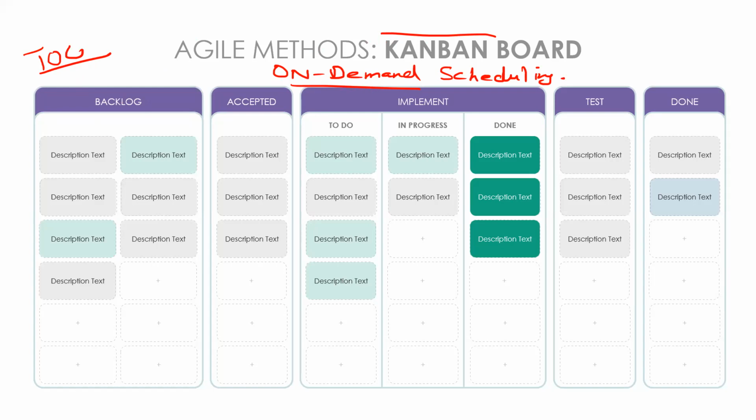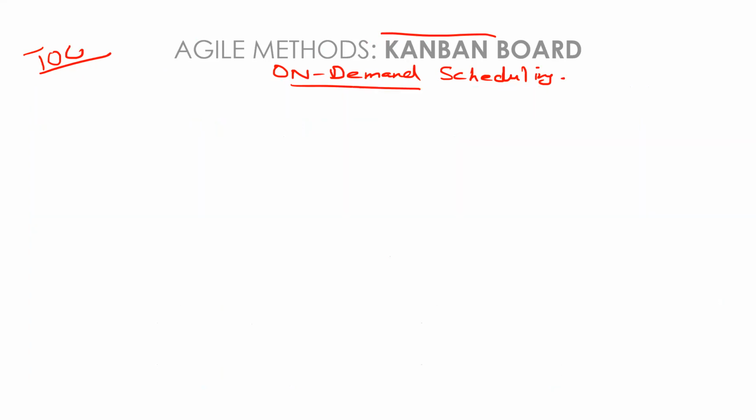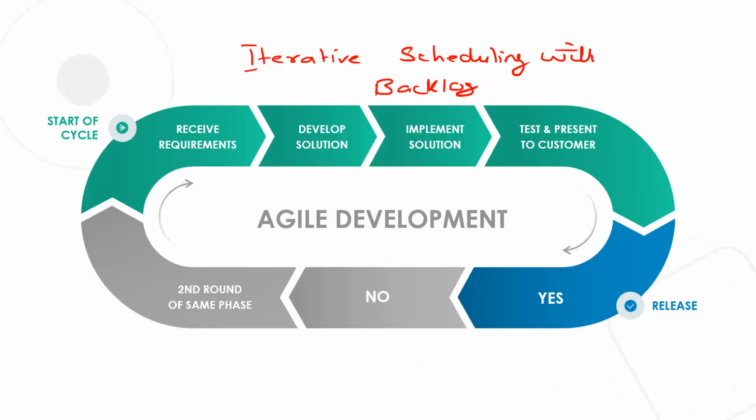Yes, go ahead. Sir, can we have the previous slide, sir? This one. Yes, sir. In the iterative schedule, can we change the dates, the timeline, or the milestones? We can change the milestones or whatever you like, but the duration will remain the same. If it was 2 weeks, it will remain 2 weeks until the end of the whole project. Actually, it's a backlog now, sir.